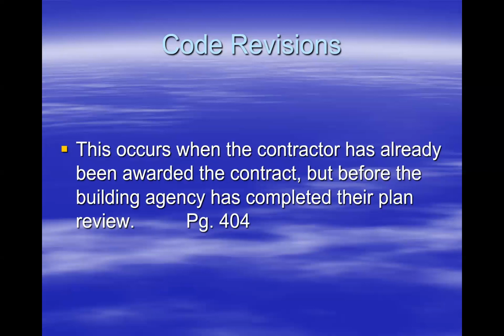That may not play out sometimes in our more current non-traditional delivery, like some of our alternative delivery systems. It is possible that we could go into a guaranteed maximum price contract based on one code, because that's what the design was developed under.